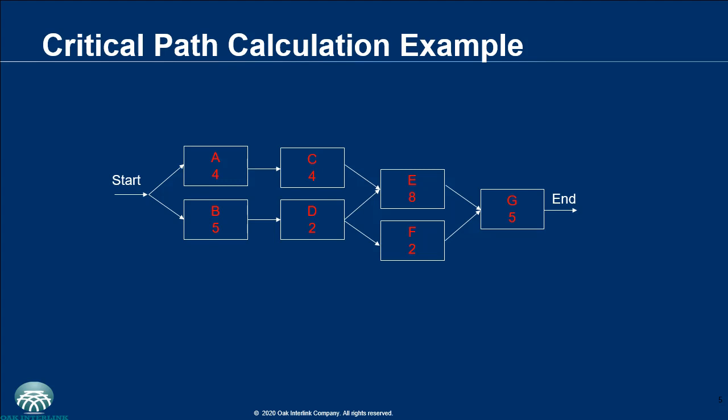Of these three paths, one of them at least is the critical path. And like we had said, the critical path is the longest path on a network diagram for a project. So when you look at this critically, you will find that the critical path is actually ACEG, and that is because it is the longest path and the duration of that path is actually 21 days.